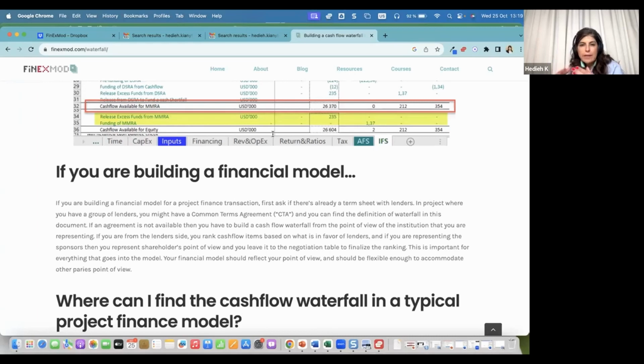But then, in terms of the impact, because we have this major maintenance reserve account, that's why the lenders want to make sure that this account is there, to make sure that we don't have this high cost chunk somewhere, because it's senior to their repayments.